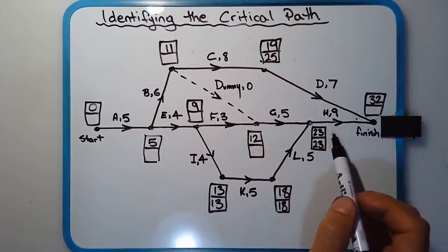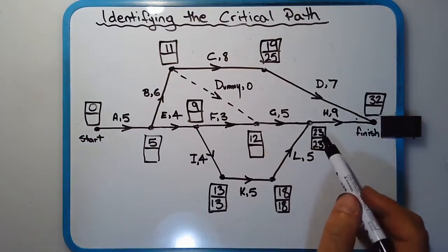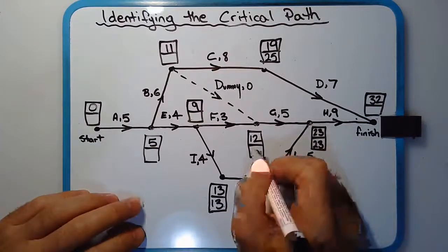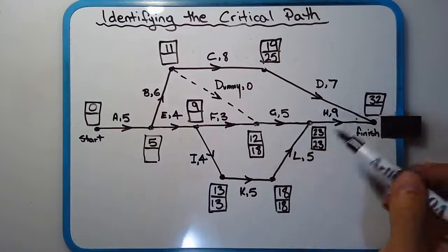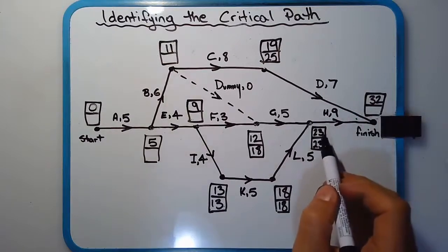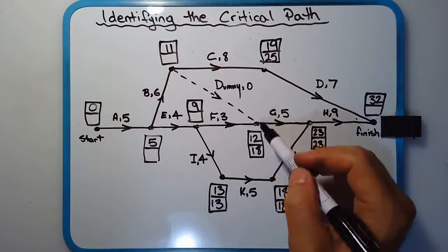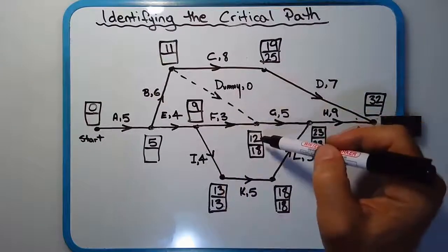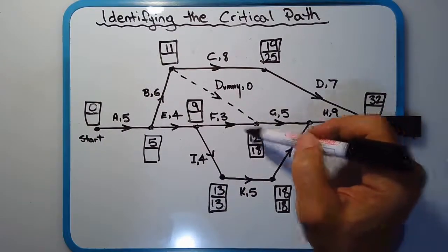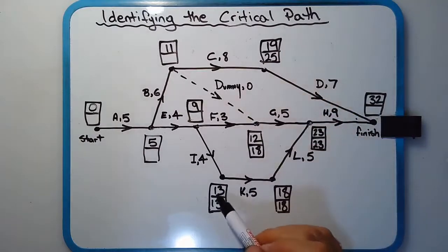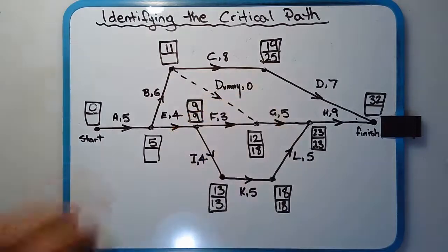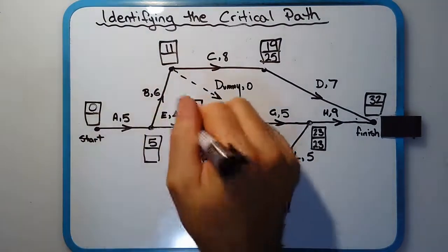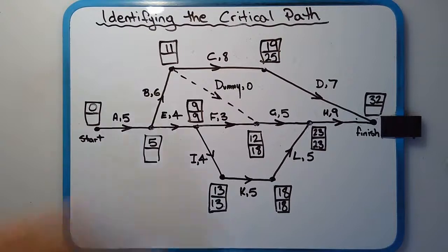So 23 minus 5 is 18. Just making sure, always make sure you check along the way as well. It's quite easy to make mistakes. So I think at this point, now we have a branch, so 12 minus 3 is 9, but also 13 minus 4 is also 9. So that actually works out well for us. So that helps us to fill in this domino here, the bottom box of the domino.